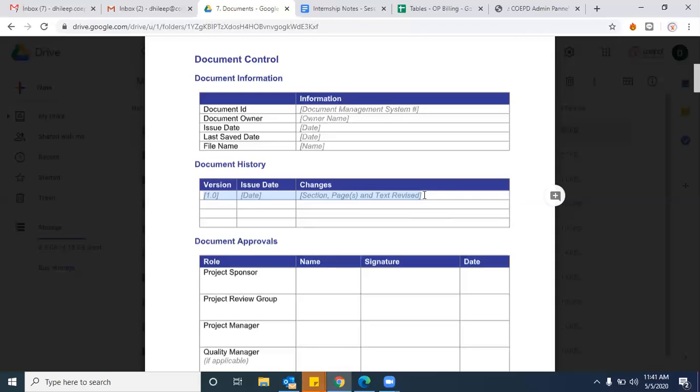So I'm saying that imagine that you're working on a particular document. If the particular version is 1.0, then after you take sign off, and then you start working on it, and imagine that the first version is approved, and then if you add more changes to it, then it will be version 2, right? So the version numbering will increase after sign off. No. Version 2 will come into picture when it is a completely big scope change.